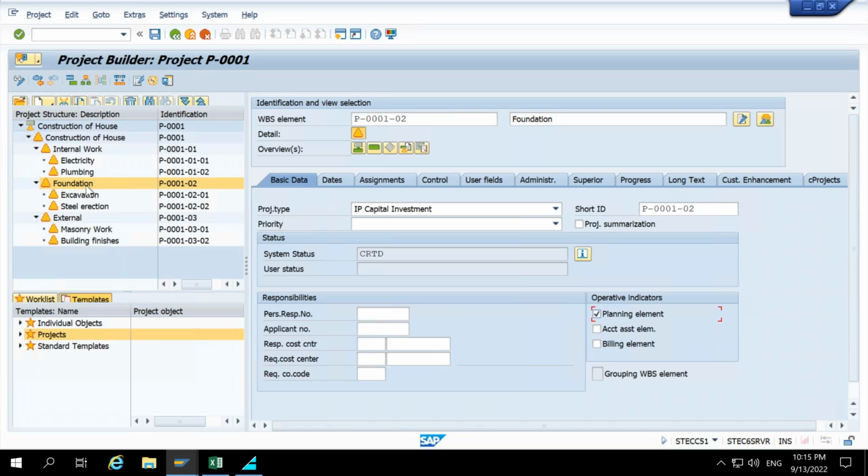So what is the logic then? See, the 20 rupees that has been left, which you are talking about, that is your actual cost versus plan cost. That is not your profit and loss. Profit and loss we have on the customer project, where we have the expenses and the revenues. Here the example you took is plan versus actual, if we have any variance. Plan versus actual.